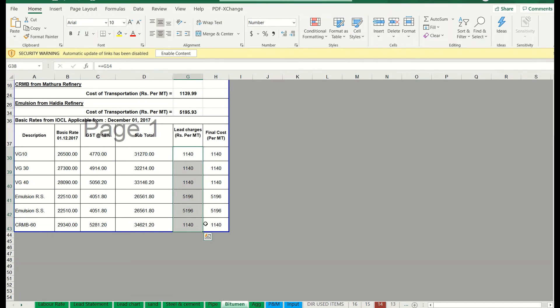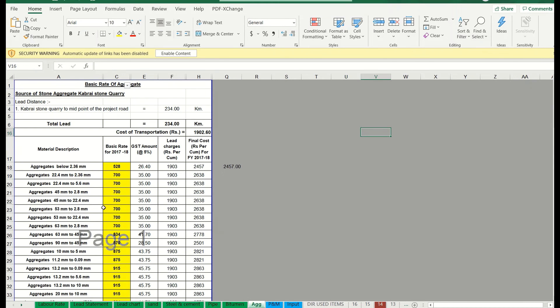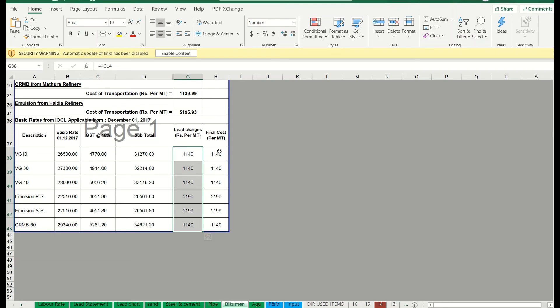Once all material costs are done, you have to link these final cost values to your cost estimate file. Whatever cost estimate file you have — based on the typical cross sections — it should be linked with the total cost of these materials. Only then can a proper cost estimate be developed.